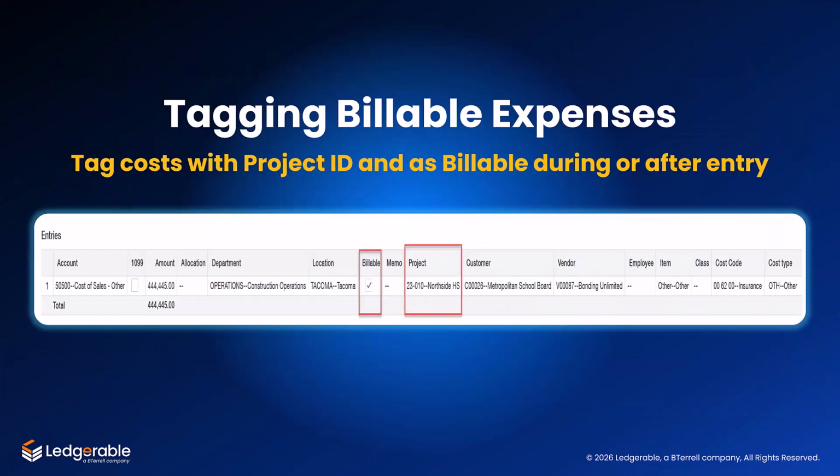Of course, project cost transactions entered through each cycle provide the source for each cycle's T&M billing. Each transaction in Sage Intacct Construction contains one or more entries that determine the project, the cost code, the cost type, along with other dimension values. Additionally, each entry's billable checkbox determines whether these costs will automatically become available for invoicing.